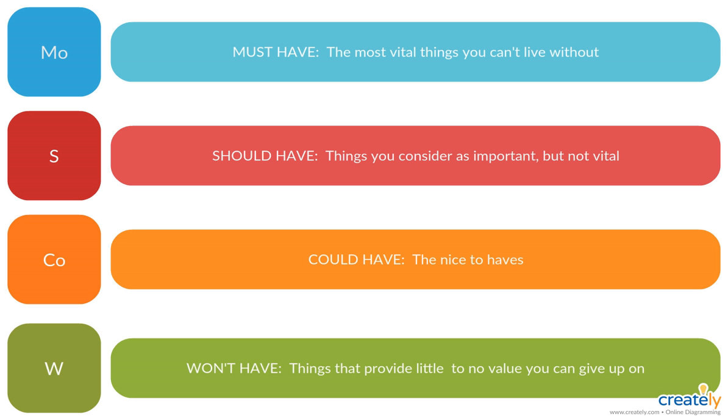So this approach that we're using here accommodates flexibility as far as that goes. As long as we've got something in must-have in the existing backlog that we haven't started on, and there's no dependency on other things, they could actually pull that out and substitute something of equal amount of effort. Okay. And we'll just absorb that change as part of the project.